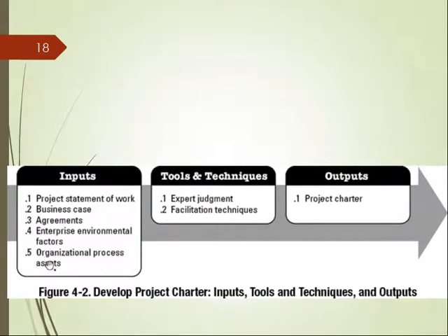And you may wonder what these terms mean. We have discussed, for example, business case, which is actually a document to explain why it is meaningful to do this project. Okay, why it's worth doing. Okay, and agreements is perhaps some agreements from the sponsor. Because for a project to go through, you need to have someone to pay for the project. You pay for the salary, pay for all the expenses. So someone must agree to buy the product that you create at the end. So there would be some agreement.